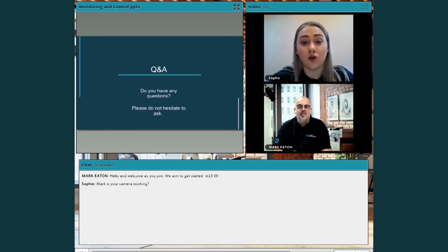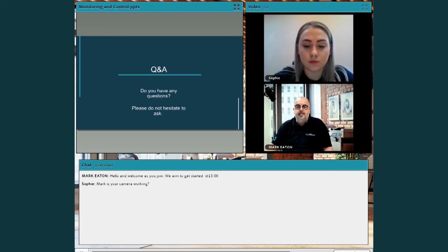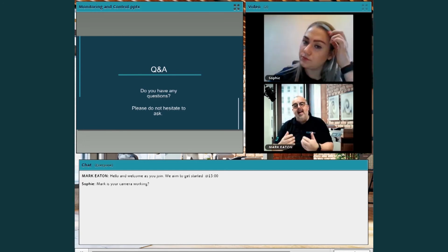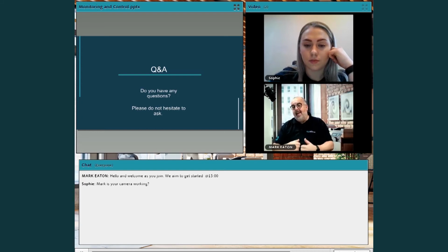Great. The third one is, at what point should the project manager shut down the project? Never. A project manager shouldn't shut down a project. It's the sponsor's job to shut down the project. And this is once again one of the dangers that project managers sometimes find themselves in. Your experience, I'm sure, is a bit like mine, that for at least one of your projects you've experienced a sponsor that won't engage, that says, oh, I'll leave it all up to you. That's a very dangerous thing to do, because then you're accountable for the outcome. Project managers should be held accountable for the delivery of the project, but not for the delivery of the change, the outcome. So it's really important the sponsor does that.